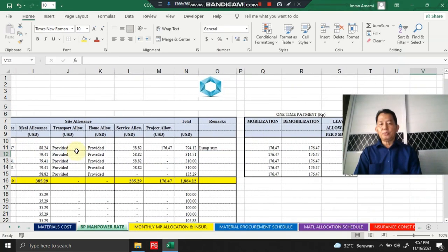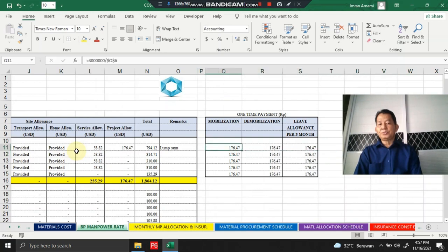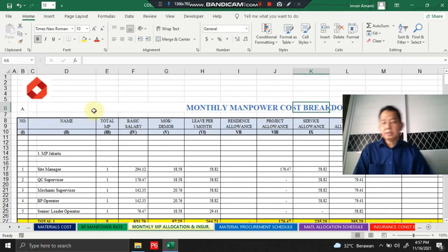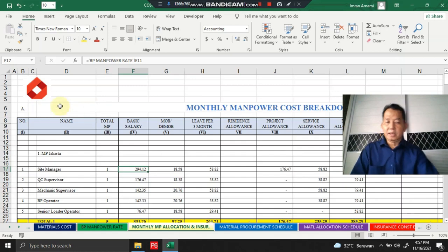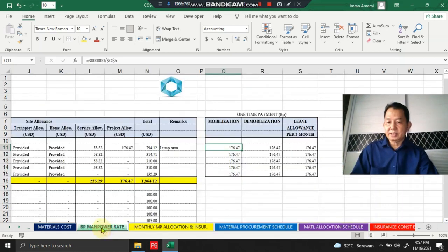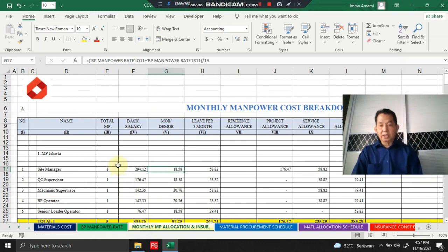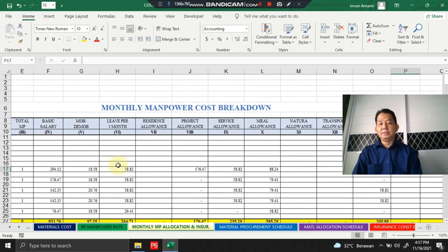Also, we calculate the cost for mobilization and demobilization for its personnel, also leave allowance for 3 months. Okay, and then based on the base plan manpower rates, we calculate the monthly manpower cost breakdown. Yes, this is based on the basic salary that we composed previously in the sheets here. And then we calculate mob demob cost, leave for 3 months, resident allowance, project allowance, service allowance, meal allowance,